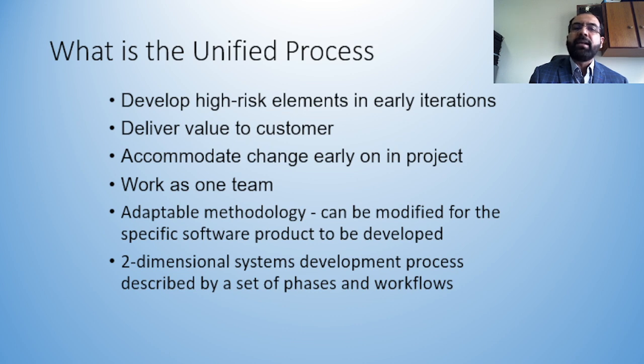It develops high risk elements in early iterations, which is very important, because once you develop those high risk elements, it is easier for us to deal with them rather than discovering them later on, when you have no time to mitigate those, and therefore it will be difficult for us. So we develop those high risk elements in the early iterations. So we actually find out these cases earlier on. So deliver value to the customer.